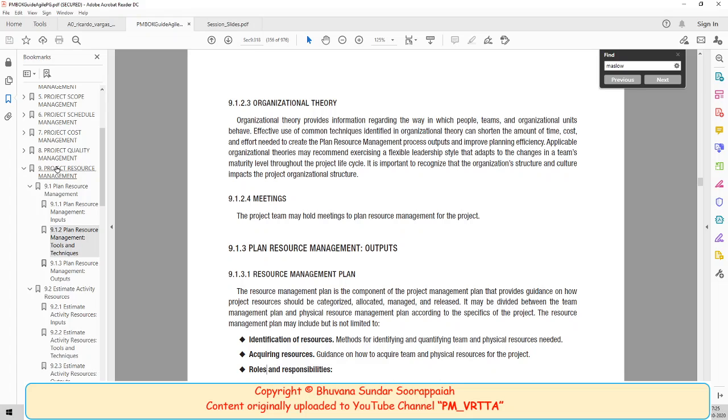It could be minus 20 percentage to plus 25 to 30 percentage. It can change. So this rough order of magnitude, everything is correct. So any bit from any percentage tolerance, that is ballpark estimate. This is useful when you have not much information but you are forced to give an estimate on day one.